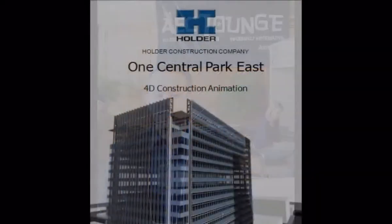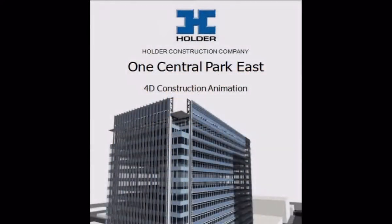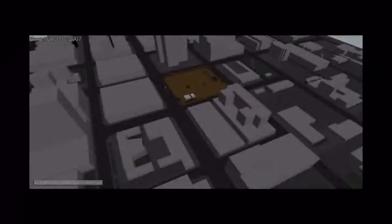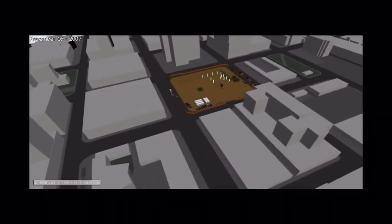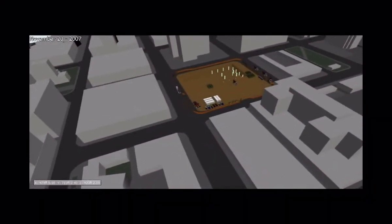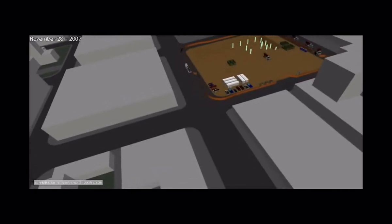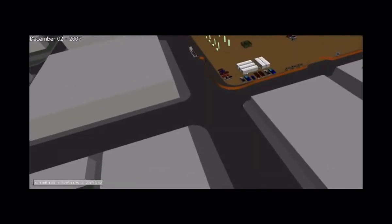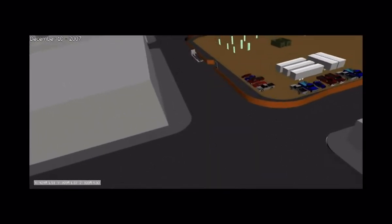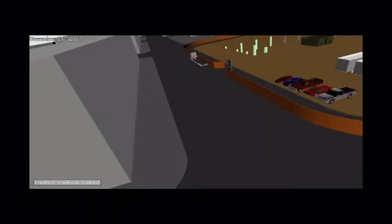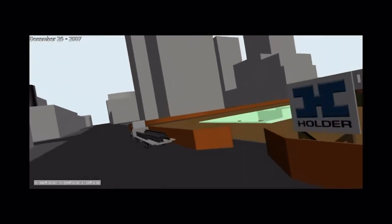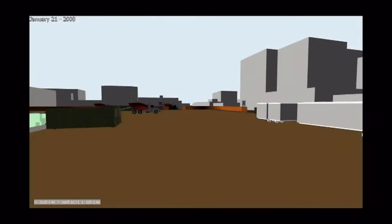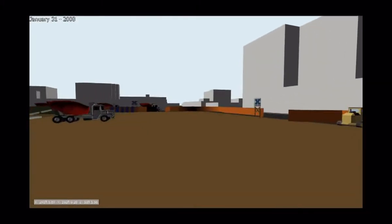The concept behind 4D really is the tying of geometry to the project schedule. You can use that throughout the whole life cycle of the project. In the early stages, you can use it for basically showing the owner how you're actually going to be building the building, so you can use it for project procurement. Once you actually procure the project, you can work with your superintendents, and they have a whole process where they can get that idea of how they're going to build the project down on paper.